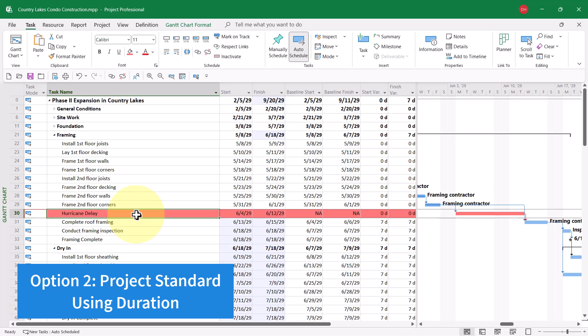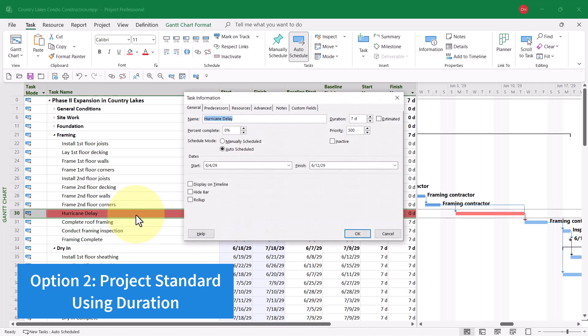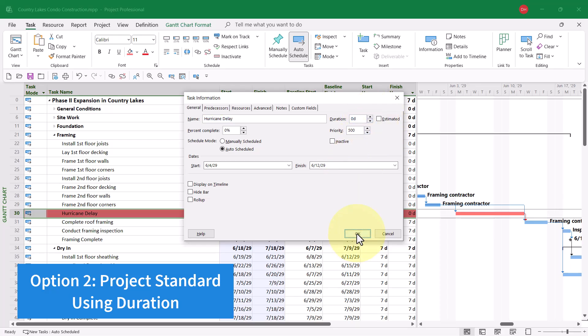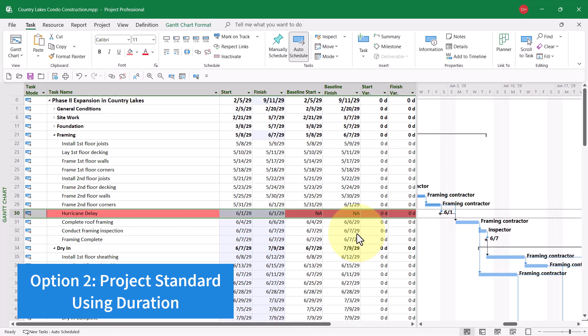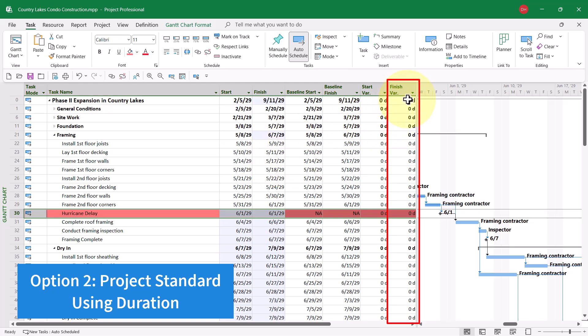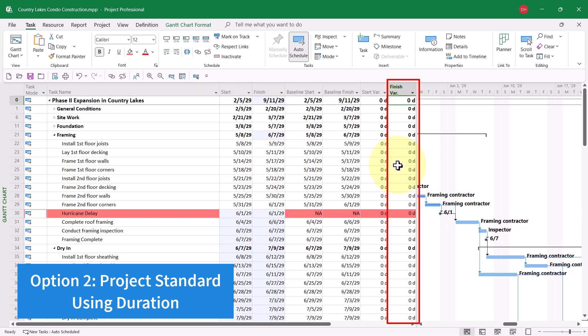and then changing its duration to 0 days temporarily. When I click the OK button, that still leaves the task in the project, but now it has no duration, so we can see the Finish Variance again returns to 0 days.